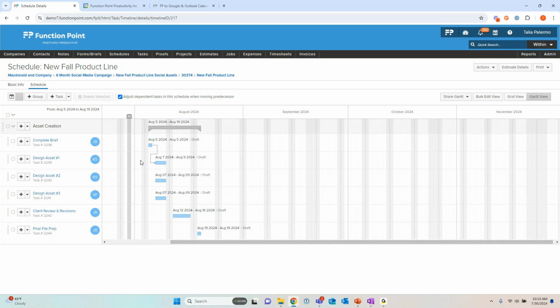So that's the third benefit of a dependency: it triggers your task statuses like a waterfall, where if I turn this one to assigned, I sort of push over that first one as the project manager to really push it like dominoes.